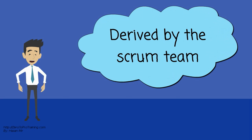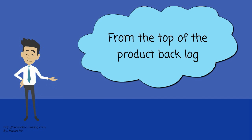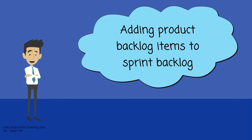The list is derived by the scrum team, selecting Product Backlog items from the top of the product backlog until the development team feels it has enough work to fill the Sprint. This is done by the development team asking, can we also do this? And adding Product Backlog items to the Sprint Backlog.